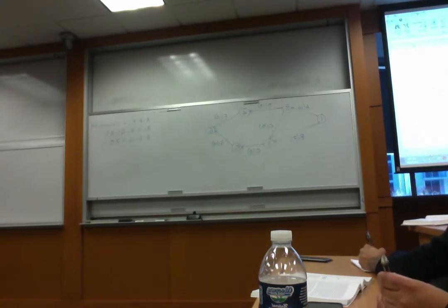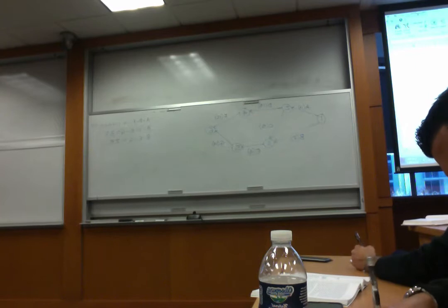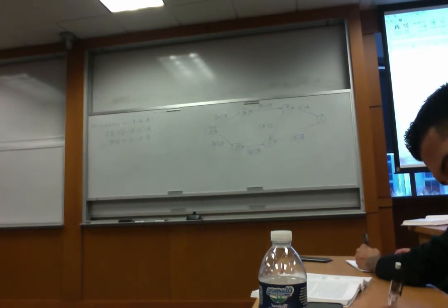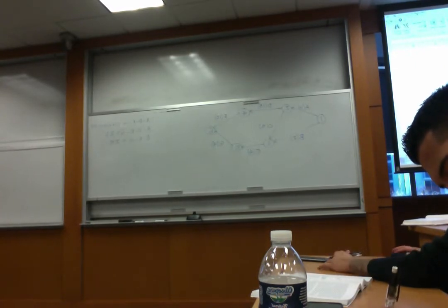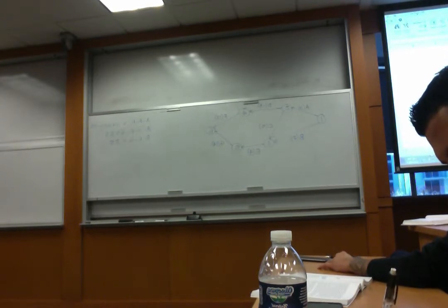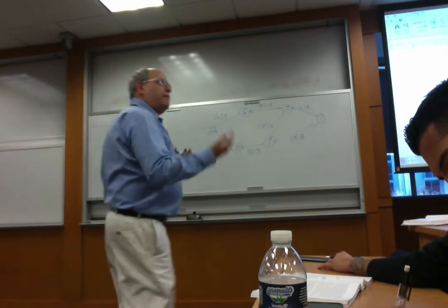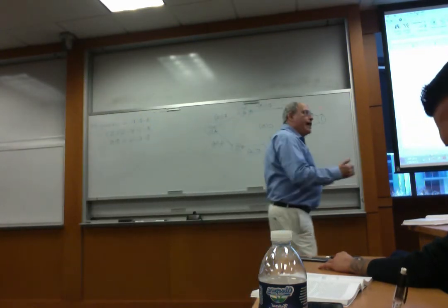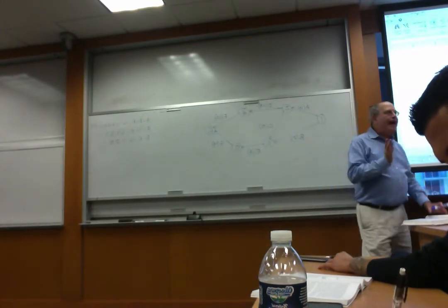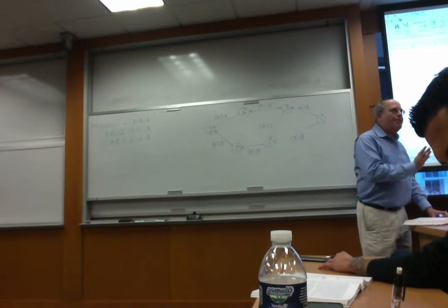But this is not the problem on hand. The problem on hand is how long it's going to take to complete the project. The project is completed only when all the activities are completed. So which one of those paths will decide the completion time of the project? The longest one. Because you can finish the shortest, but the project is not done. The project is done when everything is done. So which path determines the length of the project?